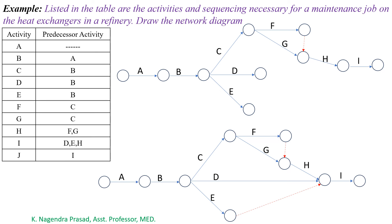So the next activity is J, and it starts after completion of I. So let's draw activity J. Here, J is the terminal activity. So next we have to give the numbers for all the events, and numbering should be higher at the head of the activity. So it should be like this — we have to give the higher number at the head of the activity. So this is the solution.